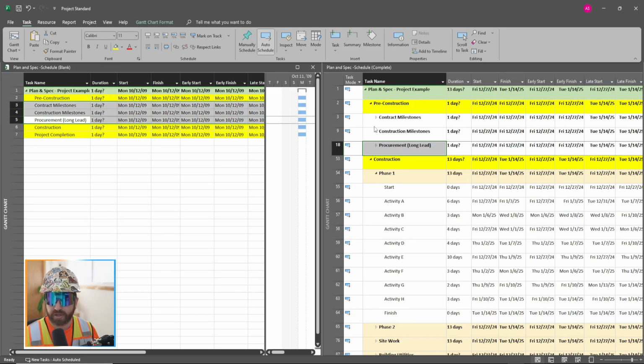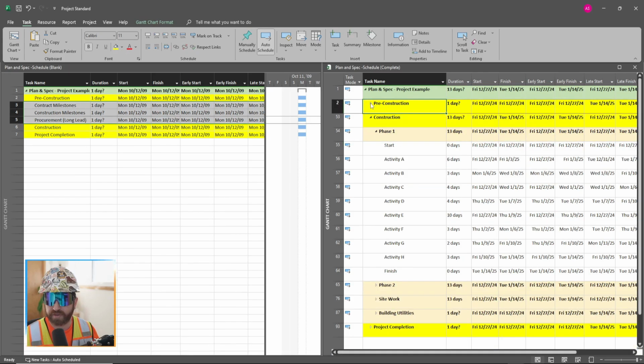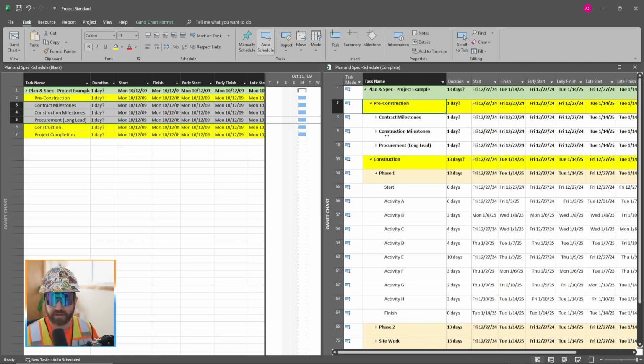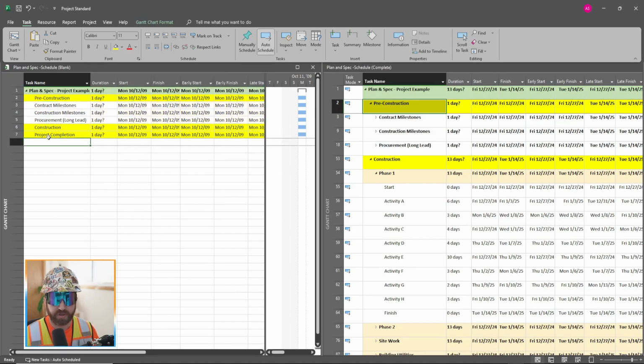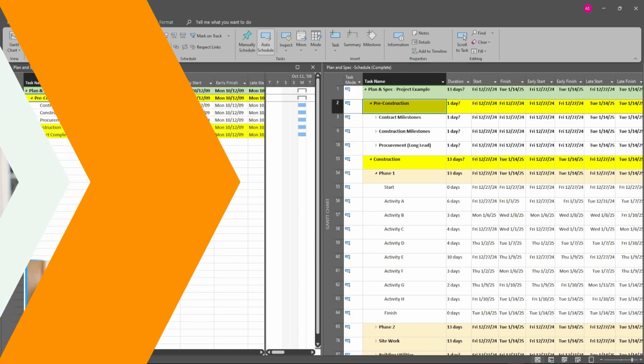So if I want to mimic or mirror what we've got on this left side where this is consolidated and organized a little neater, I'll just left click this 3, drag down, and then click this indent. So now these are all subtasks under this overall header, and we can see we can collapse and expand that.